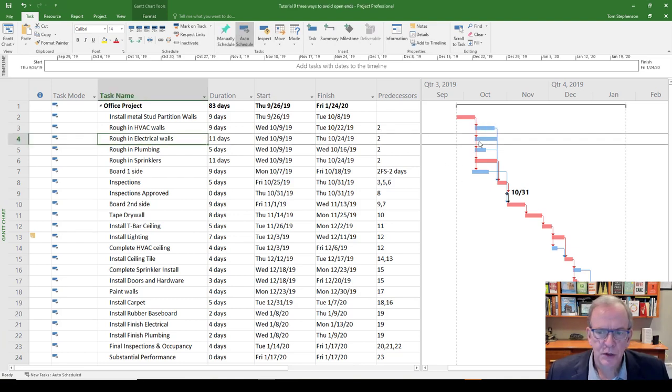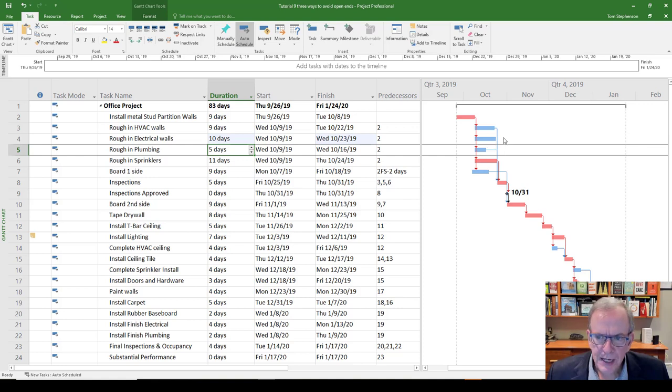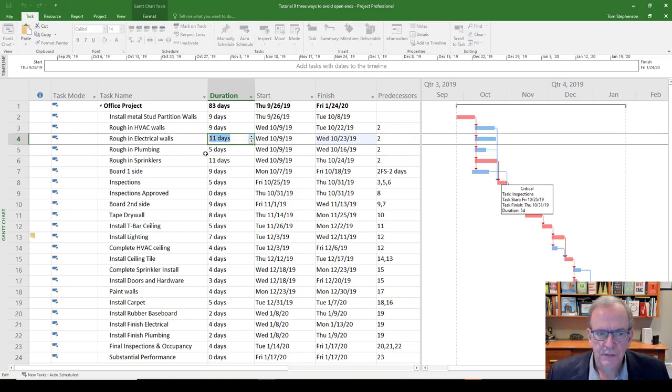Now, the critical path is the longest path through the project. Then my first question would be, why is this not red and it's blue? Because if it's the longest path, it seems like this is tied to this one. It looks like it's linked through, but actually, it's touching here, but it may not be linked, as you'll see. If I shorten this by 1 day, 10 days, you'll see that there's no connection to the succeeding tasks, right? The successor task.